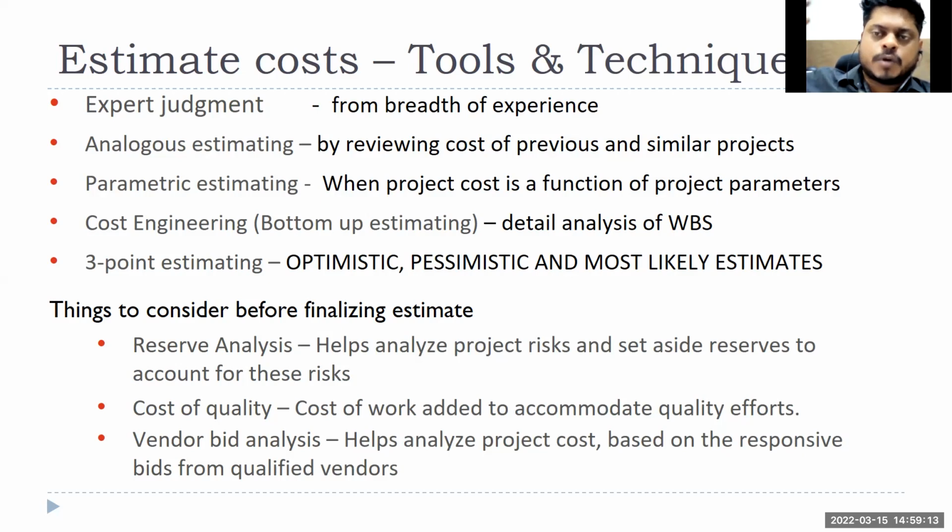As a project manager, one of your biggest tasks or roles is to anticipate risk. There will be some known risks, there will be some unknown risks. Obviously unknown means you cannot anticipate events like COVID, but for known risks, like the rainy season, rain will happen, so there will be a stoppage of work for 2 to 3 months or 2.5 months, right? As a project manager, that should be common sense which you can anticipate.